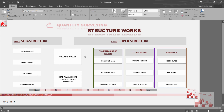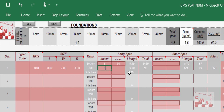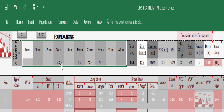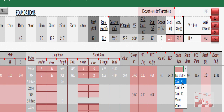Using minimum inputs — for example, if we choose the foundation — we'll find a screen where we only insert the numbers and dimensions for the foundations with the rebar reinforcement according to the drawings, including bottom and top reinforcement for the long and short span. CMS directly gives us the quantity of reinforcement concrete, quantity of blinding concrete, detailed quantities for rebar per diameter, ratio between rebar and concrete, waterproofing, and shutters for the foundations.